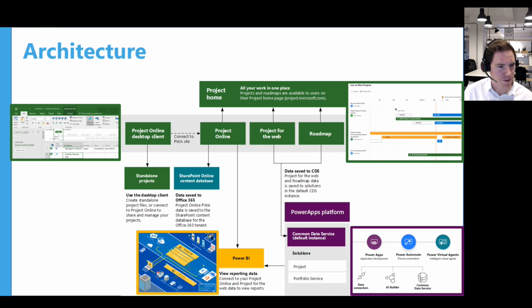This diagram I've put together from different component parts that we use here at iCoTech. But this is really to show that if I use my pointer or the cursor, you've got effectively Project Professional here, and it's a desktop client, but it connects to Project Online as a SharePoint service. And this connection is seamless. It's clicking a box, it opens up a Microsoft Project file. You can edit that file and then press publish, and it goes back up to the reporting server, and every single task line in your schedule is being pushed back into the database. So you can do some great things with that.